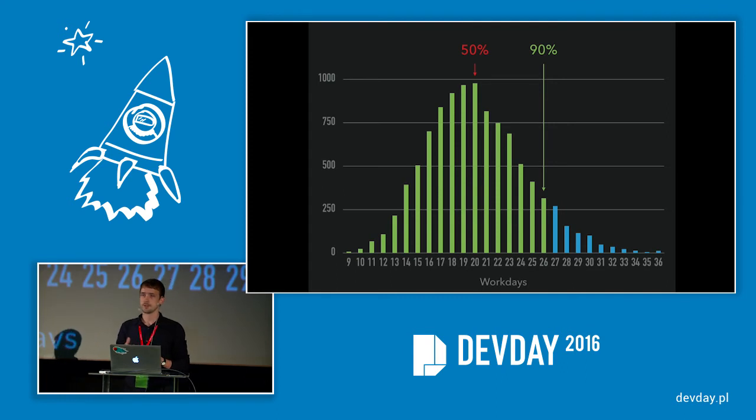So what are some of the other benefits of statistical forecasting? Well, if his client comes back and asks for an estimate for 15 tasks, well, he's got the data, he can just click a button, and he's got a new estimate. Secondly, as I mentioned, there's less human bias, so it's better information for decision making and planning. And lastly, you can take the data of old projects and apply it to new projects. Of course, you have to be careful with the assumptions you're making, and ideally it's a similar team with a similar type of project and similar complexity of tasks. But yes, we can do that.